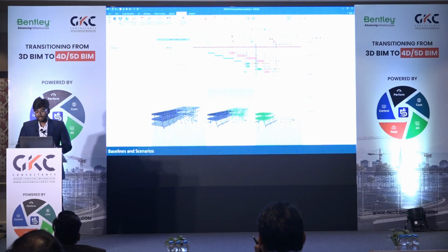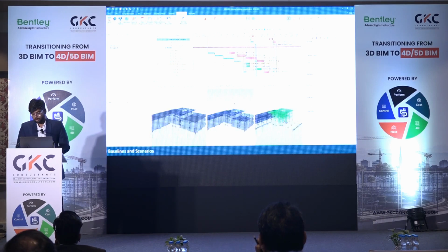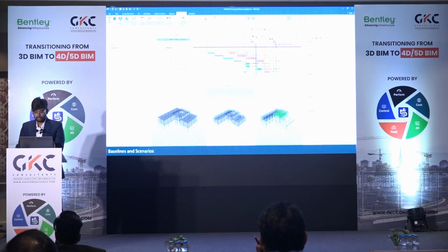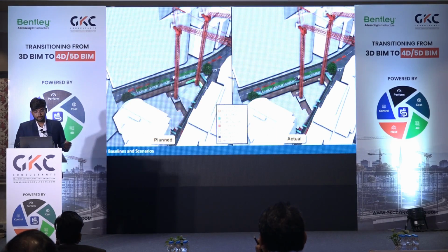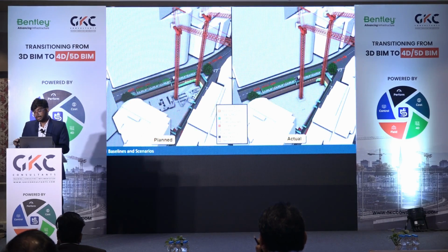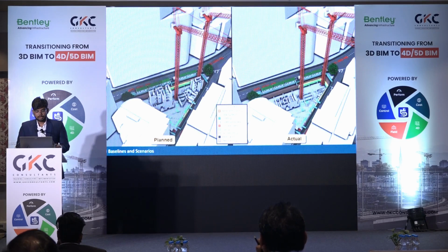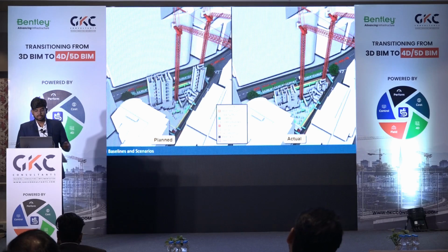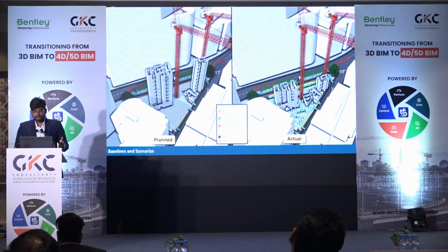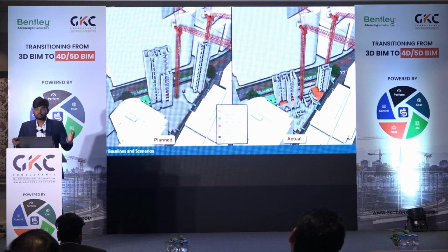Before you go for the best one, note that the side-by-side comparison is not only about the baselines or scenarios that you want to try out. It can even be used for plan versus actual when you are doing your review meeting. So here, for example, we have two baselines, one for the planned and one for the actual. How we collect the actual information from the site, I will come to a bit later. But here we can see the difference between the plan and the actual, and we are seeing it side by side. Now, just looking at the planned might not convey it in the intuitive way you want it to.